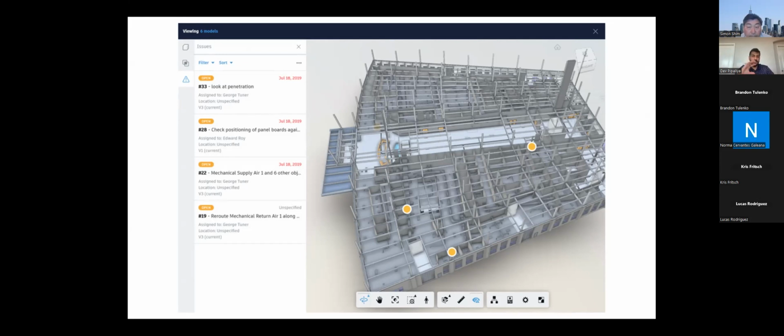And when you see it in reality, it actually makes a lot of difference when it comes to time, especially. For example, if someone comes with a duct and when they try fixing it they see it's actually going through a structure, that's a lot of rework. You'll have to go back to the shop drawings, change things, bring in the new duct, and do all those complex things. But when you have a model like this, it just makes a lot of things easier.